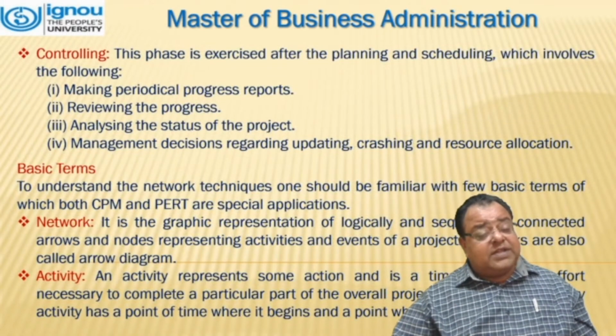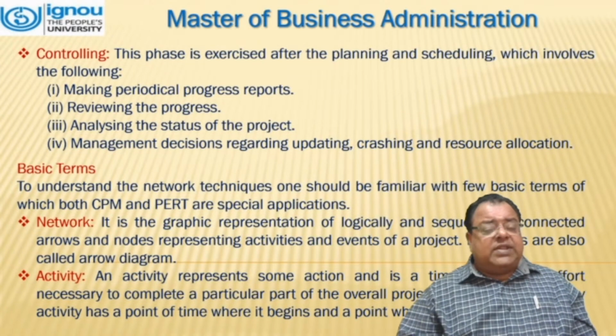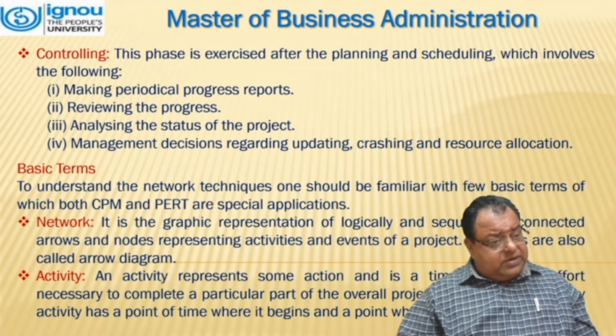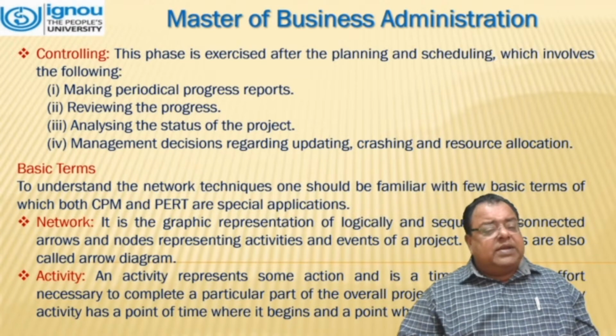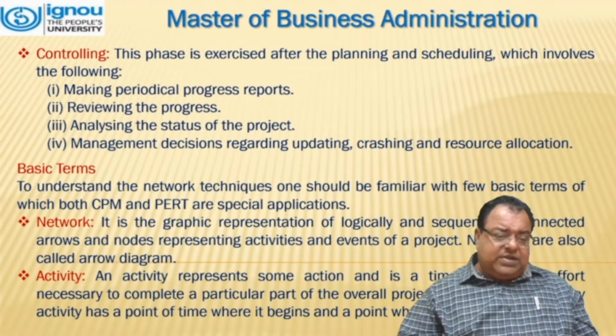Third one is controlling. This phase is exercised after the planning and scheduling, which involves making periodical progress reports, reviewing the progress, analyzing the status of the project, and management decisions regarding updating, crashing, and resource allocation.